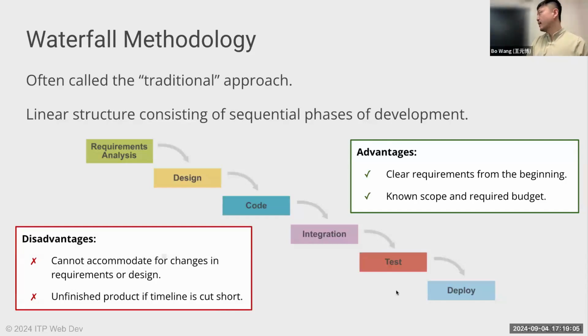that's pretty straightforward, right? It's very hard to accommodate change. Think about a project that lasts a year or 2 years. And if the market has changed, AI just started, we don't need this project anymore. Can you shift your requirements? No, I'm sorry, this is our contract. You're billed $100 million and this is it, right? So it doesn't let you accommodate a lot of changes at all. It's hard to make a shift in between.